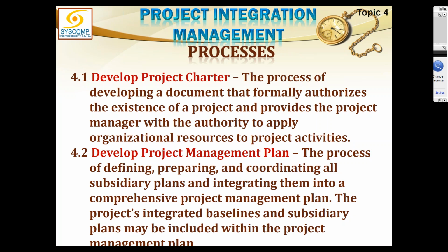So there is a minimum requirement of 11 subsidiary plans to be included in the project management plan. And those management plans are integrated together into a comprehensive project management plan, and the project's integrated baselines and subsidiary plans may be included in the project management plan. So one, we have talked about what are the subsidiary plans. There are 11, minimum 11 subsidiary plans, but there could be more.